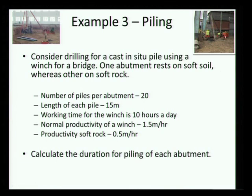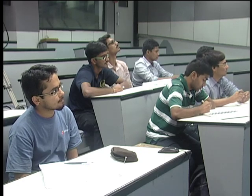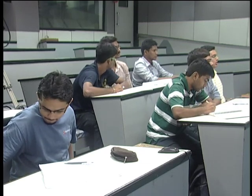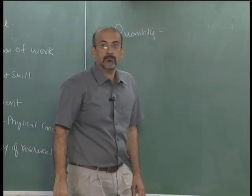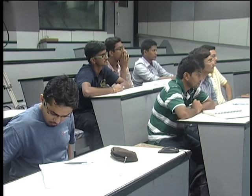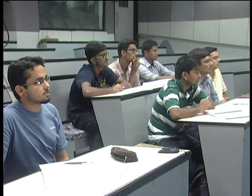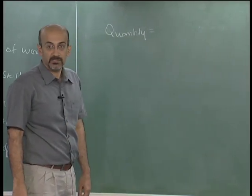Straightforward — why don't you just do the calculation? So, what is our quantity? The productivity is given in meters per hour, which means meters per hour of pile length. So it makes sense to put my quantities in meters, which means the total quantity is 20 piles into 15 meters per pile.